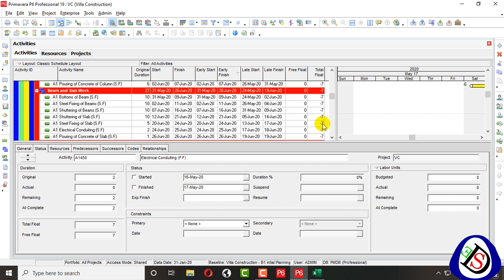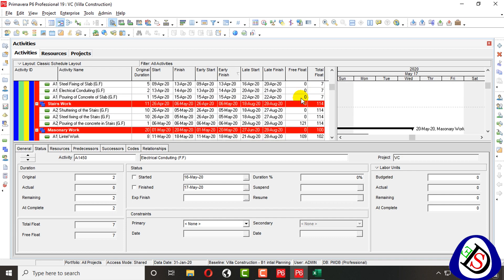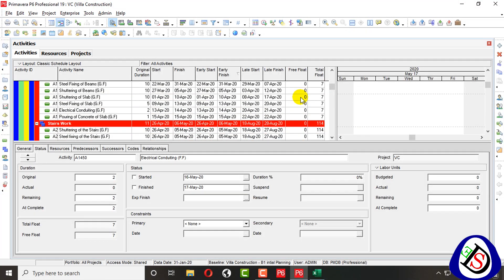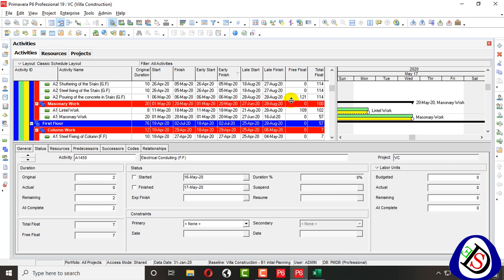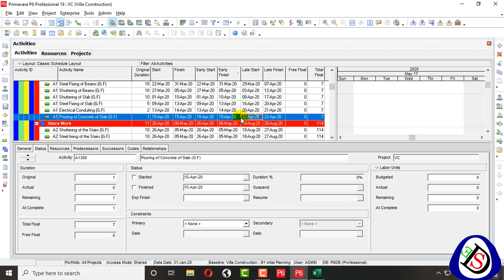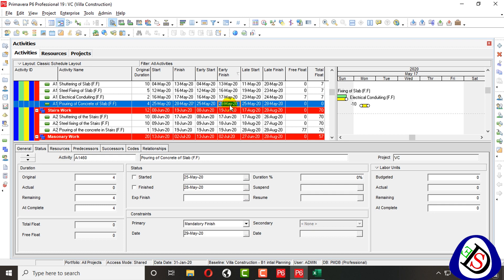You can see minus 7 on subsequent activities and plus 7 on preceding ones — meaning 7 days delay due to this Mandatory Finish constraint. The activity itself gets zero float, the upcoming activities show minus 7 delay, and the past activities show plus 7. This is the effect of assigning Mandatory Finish to this activity.